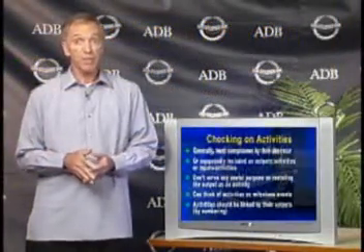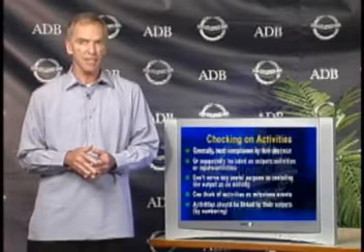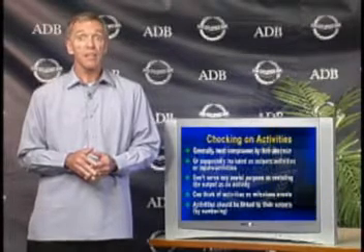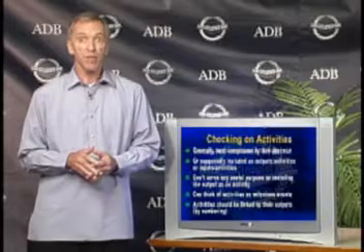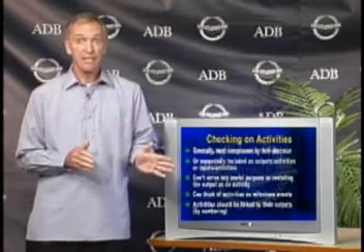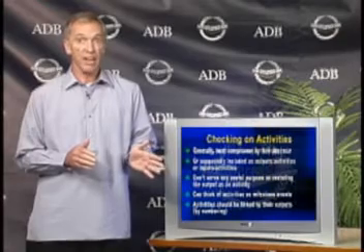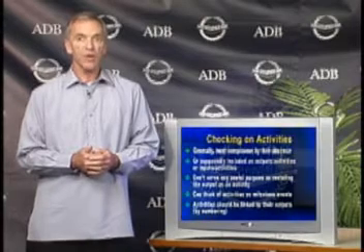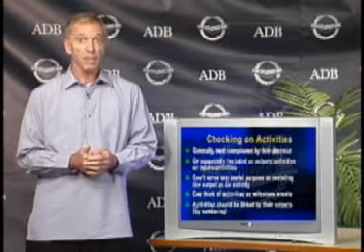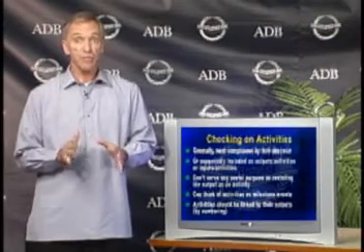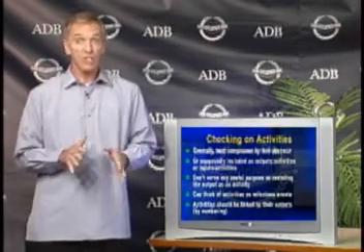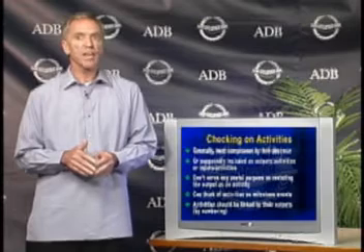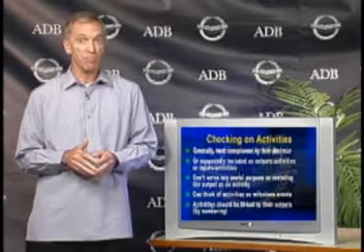Now at this point probably I'm going to digress a little bit because we need to consider what happens to the project framework after a project is approved. For loan projects, the project framework goes in two directions. Firstly, it goes to the Project Administration Memorandum, and in that document it gives rise to the format for executing agency progress reports, so that those elements that we've included in the project framework as being the result areas and targets and indicators are likely to, or should be, monitored and reported by the executing agency.